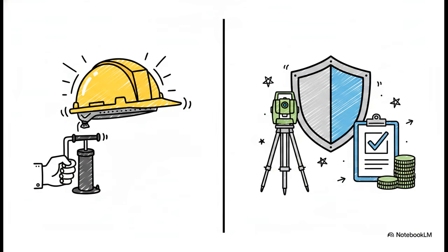The stage of completion has to be determined using a reliable and verifiable method. We're talking hard, concrete data here, actual costs incurred, physical surveys, or physical progress tracking. And it all has to be backed by supporting documents. You literally can't just guess or make up a number.